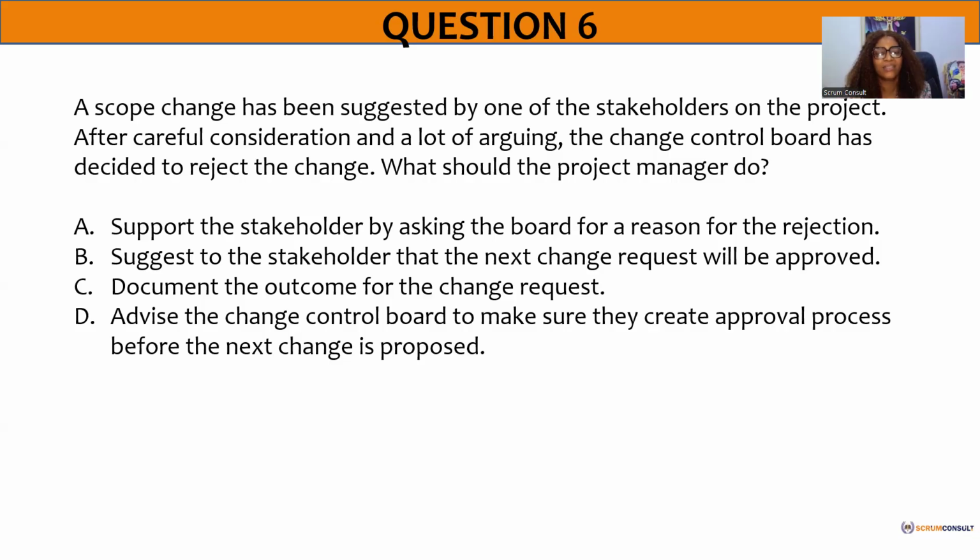Dr. Alex said C. Yeah, I think it's C. Okay. So you are going to be seeing a lot of questions like this, and this is not taking you from the beginning. Please note how these questions are. It said the change control board has decided to reject the change. At that point, what comes next? If you know your procedures, you know what it updates. So you go ahead and document the outcome for the change request and communicate last. If they ask what's the last thing to do, there would have been an option for communication.